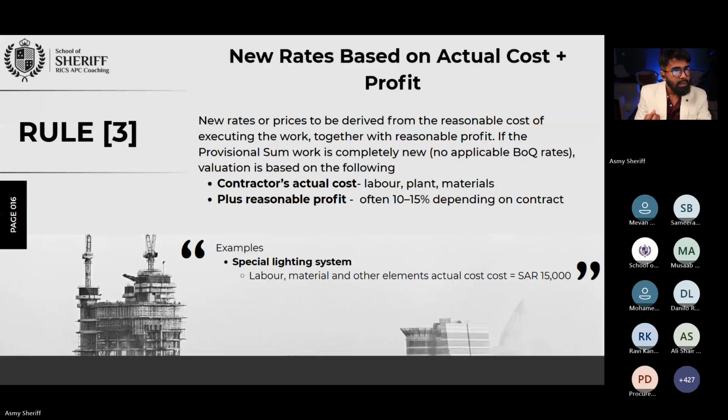Why? Let's say the contractor will come and tell the employer, I could have invested this 20 million, the money that he spent for the planting and everything. Yeah, he spent his own money. So he can come and argue with the employer, I could have invested this money somewhere or in another project where I will earn 10 to 15% of profit. He's right. Why should he spend 20 million for 6, 7, 8 months for you without earning any profit?